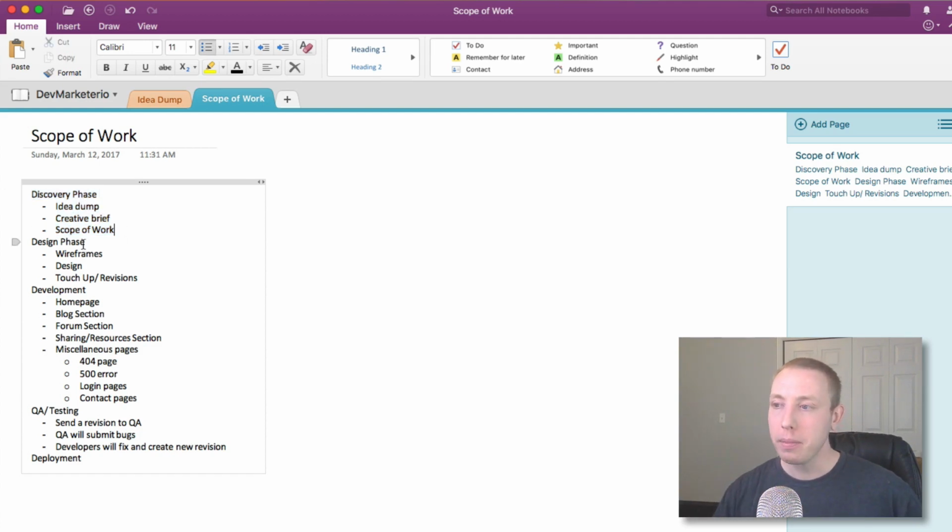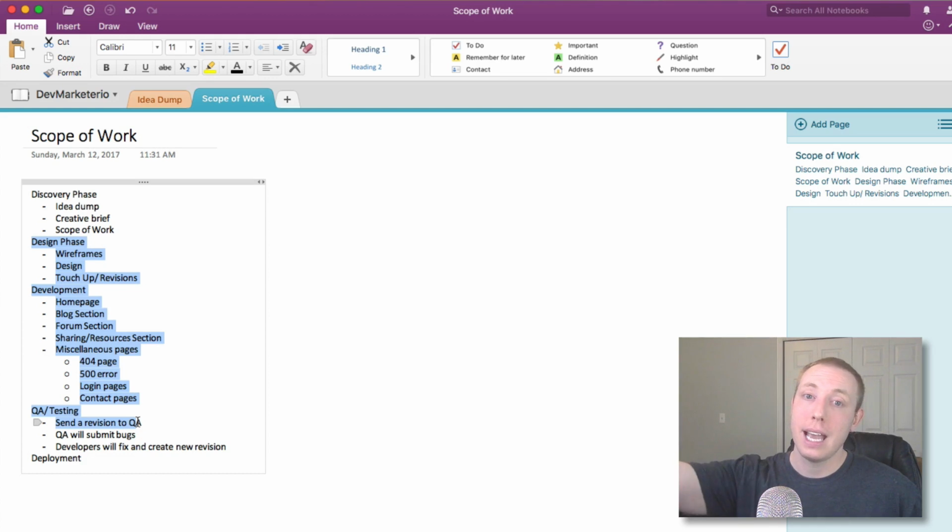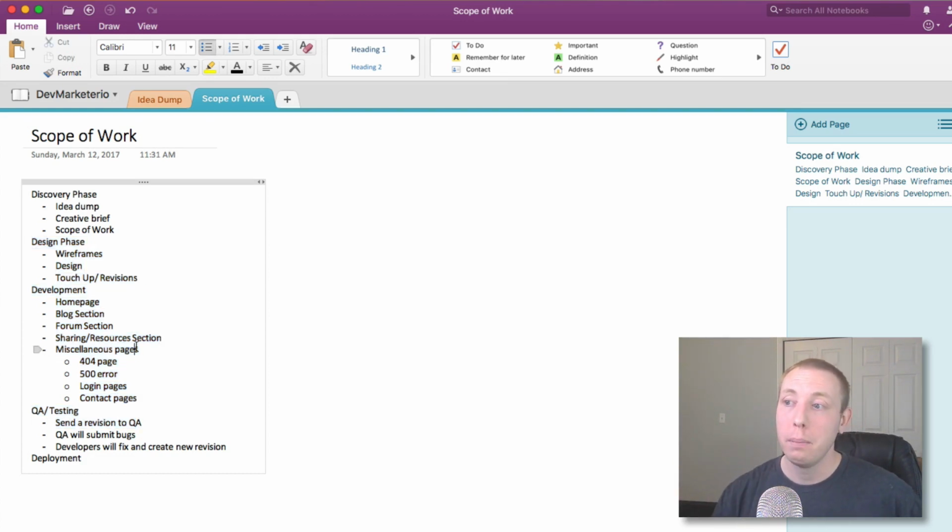Normally when we get into these phases, this is when we start the design phase. This is normally when I would take a deposit. Generally it depends on how long the project is. Generally 30% or a third, 33%. If it's a short project, it would be 50%. If it's a super long project, like it's going to drag out for 6 to 8 to 12 months, then maybe only 10% or 15%. But as a rule of thumb, it's almost always 33%. So take 1/3 of it up front.